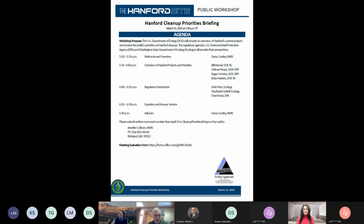So I agree with Delmar. So in terms of your question, when would we expect to see budget? We'd expect to see budget for that report in 2026. And then in 2029, DOE has to give us a permit modification that describes the treatment and disposal. And then in 2035, they have to negotiate milestones for disposal. So those milestones would drive the funding request to answer your specific question.